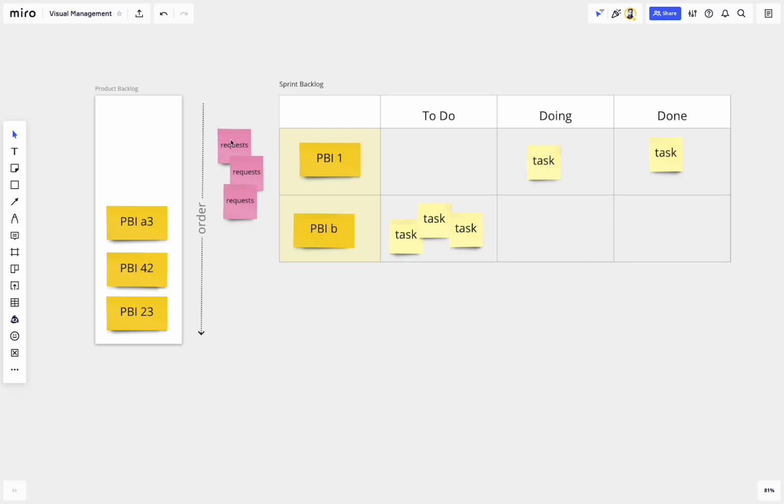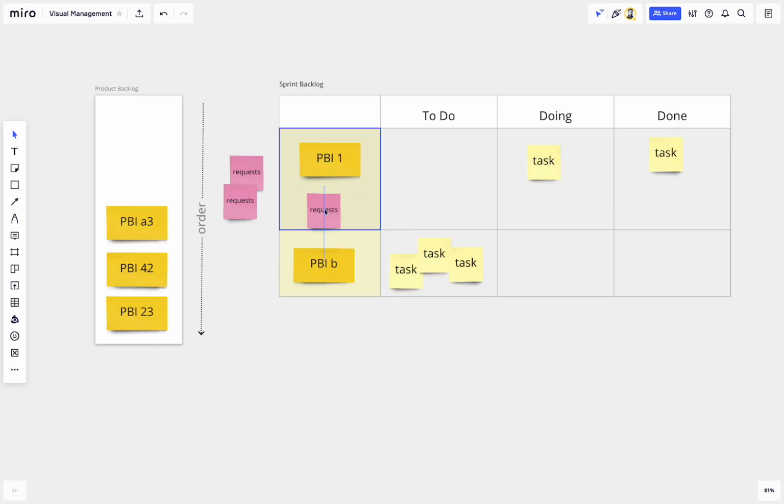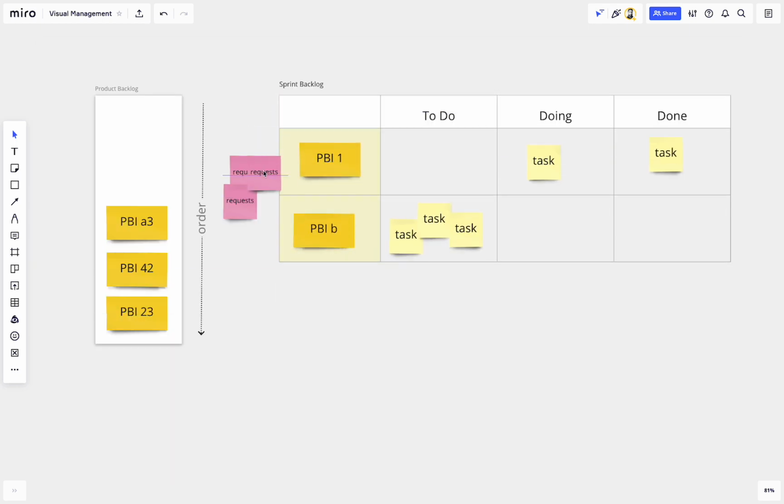Okay. First is we visualize this, right? And then by visualizing this, we can start asking questions: okay, is this more important than that, or more important than this one? So it already can fight for priority between all of these items, right? So that itself is a good first conversation. If it ends up being, okay, this is less important than everything else, well, can you wait? We can do it after, right? And then we can plan these items. Okay, so that's the one scenario.